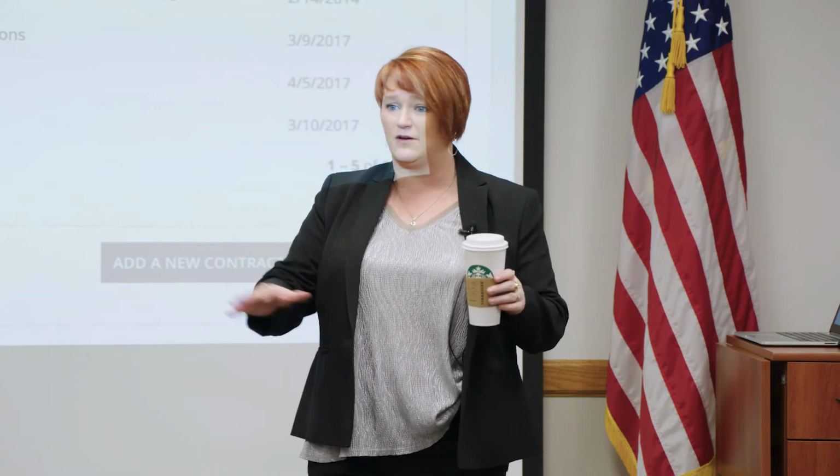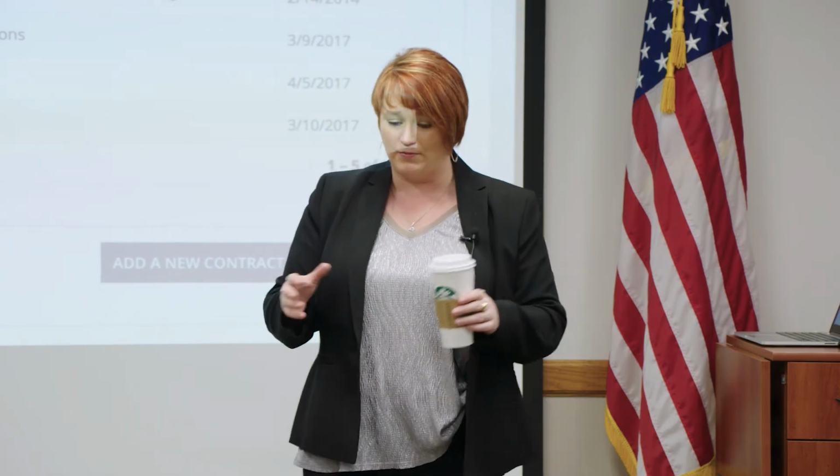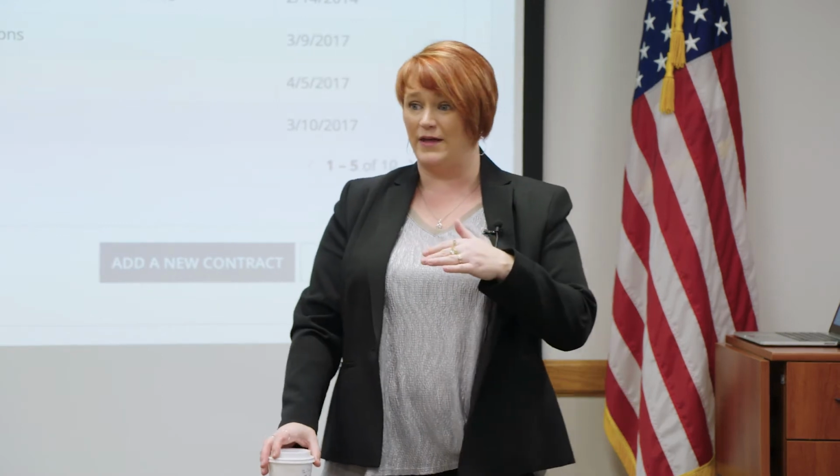It's not something that has to go in front of your board and be all legalese up. A contract is an agreement between the two of you. So you can take that bid, and then you can send an email to the provider and say, today I'm choosing your bid. We're going to go with you pending E-rate funding, and you could PDF that email. So you could attach 2 documents up, and you could have the bid and the email. You could have the one bid with signatures.